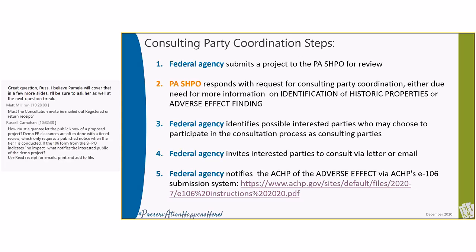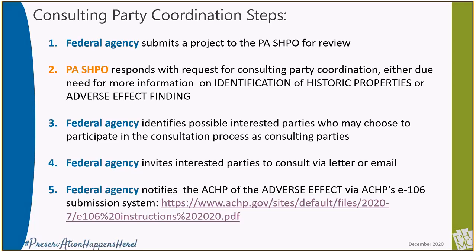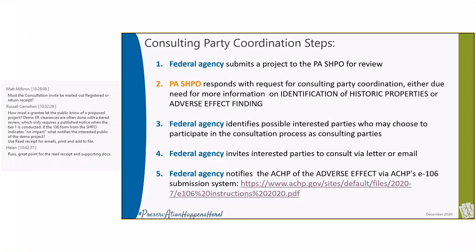I'm trying to think how to... if the demolition does not involve a historic property, the consultation process, the adverse effect is avoided, or there is no adverse effect, and the consultation process is not necessary. HUD has a number of requirements for notification of the public of the carrying out of project, or at least program activities. The only time you are required to solicit public comment is when there is an adverse effect.